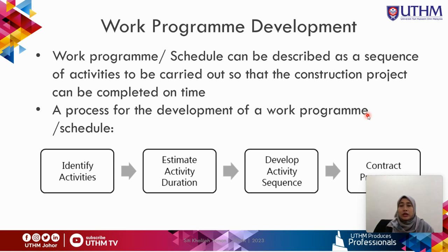Okay, so a work program or schedule can be described as a sequence of activities to be carried out. Even though you have identified what the activities are, you also need to identify what activity is going to happen first, what the precedence activity is, and what the next activity is.